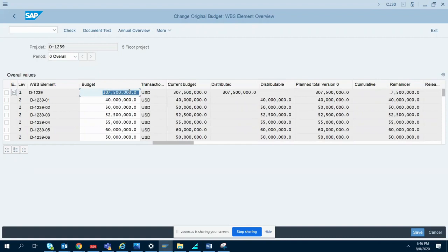Because it should be equal. More is no problem. Less means the condition is not satisfied. Exactly. So if you accumulate, suppose x plus y plus z, whatever values you give, it should be either that minimum or greater. It should not be less. If it is less, you cannot distribute values to lower levels. That is the fundamental. Okay.